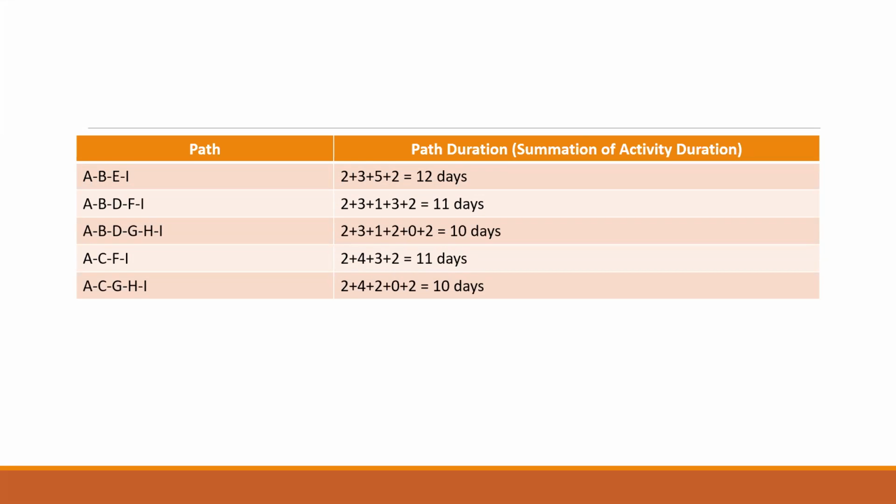So if I delay the activity A, B, E, or I, the overall completion time of your project will get delayed. That means you have to be very careful while completing your activities A, B, E, and I. You cannot delay these activities.